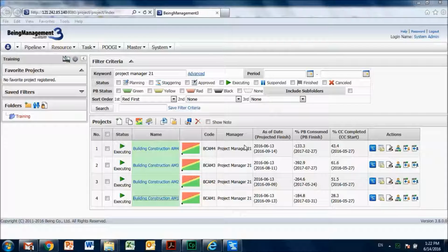In this software, there is a feature to find out the prevalent critical chain at any given point of time. When we plan a project, we will come up with a particular critical chain, and as we execute the project, that critical chain will change. So this software has a mechanism to track the most prevalent chain, and it uses the same name. It is called the most prevalent chain. So it has a feature to find out what is the most prevalent chain at any given point of time that should be focused.